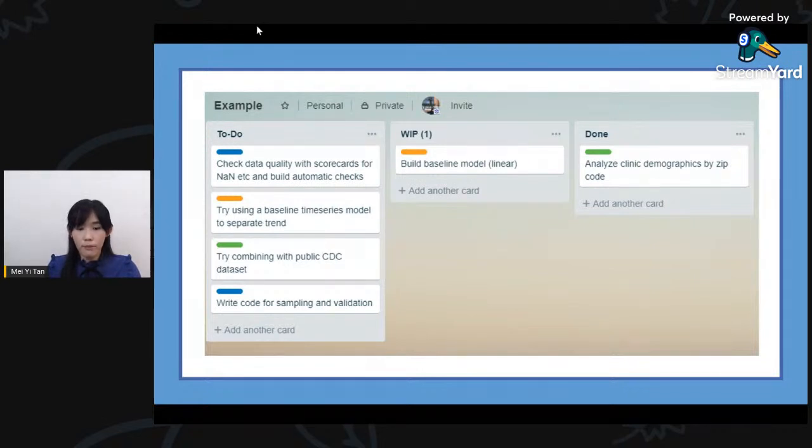So from the conversations, we will have next sessions to identify the durations and the proportions of time needed for the data cleansing. Usually if we have maybe 2 sources, we will spend around 2 or 3 weeks working on that, depending on the size and the source of the data.